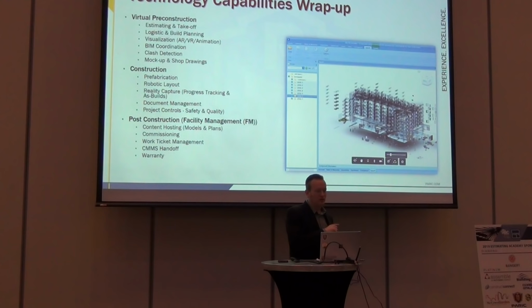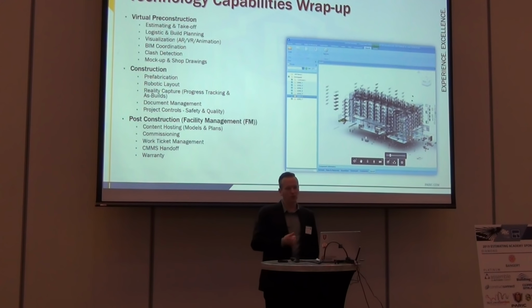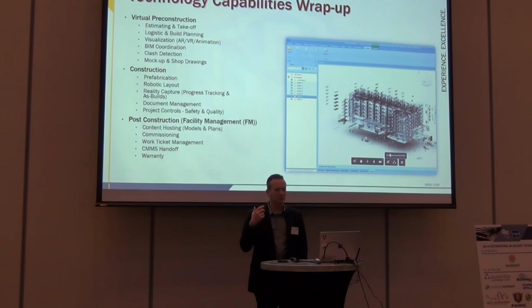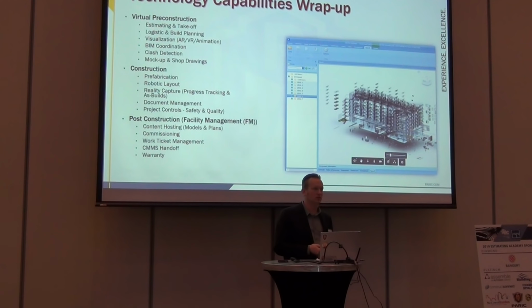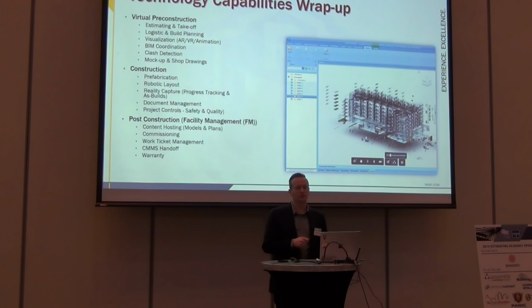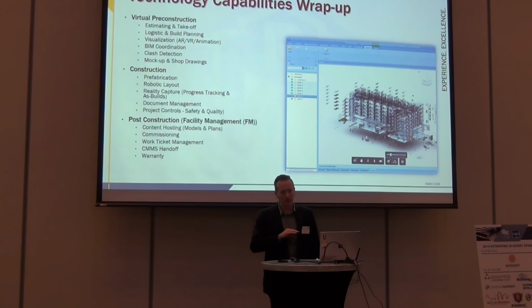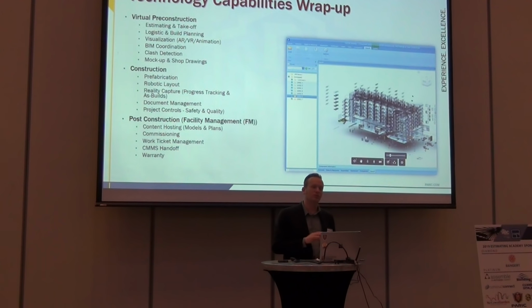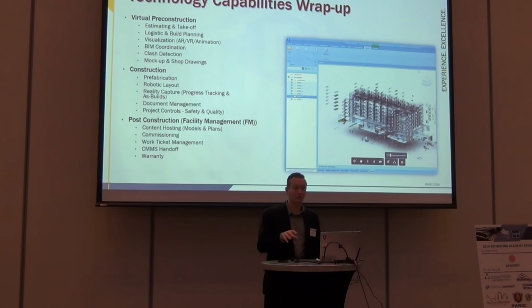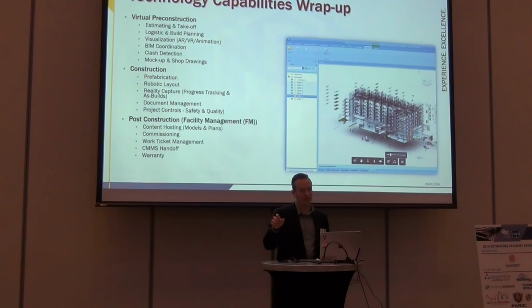So we get through the construction cycle, now we have a fully coordinated model with all the documents, the entire history of how it was built and how it was commissioned, and now I can hand it off to someone who's going to actually operate that facility. If I'm a semi-sophisticated owner, I have an awesome database to start with. And I don't have to go and laser scan it, I don't have to go and run drones over it, I don't have to go and have somebody else model it. I just start with the database that is already created for me. And I just got to take off from there.